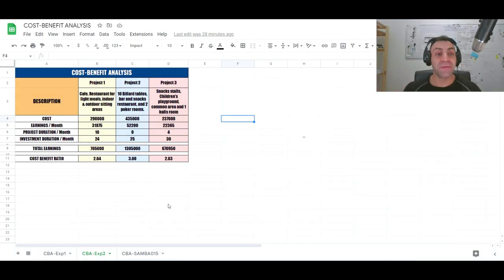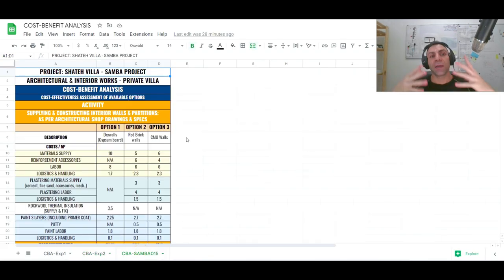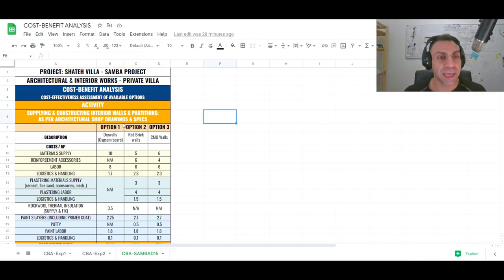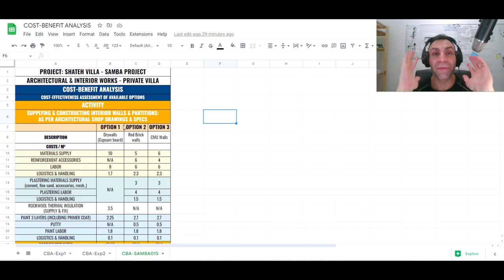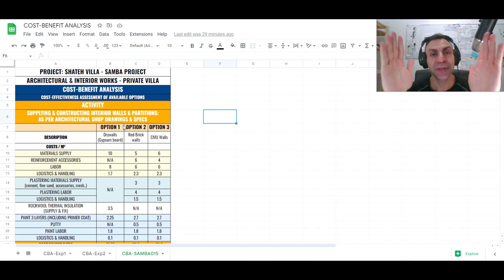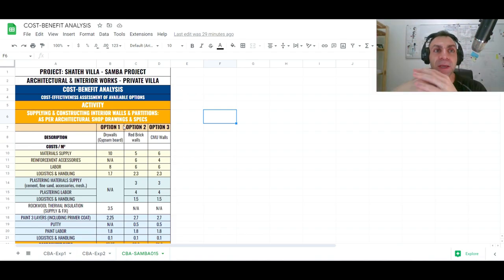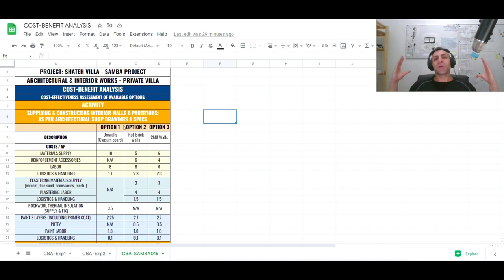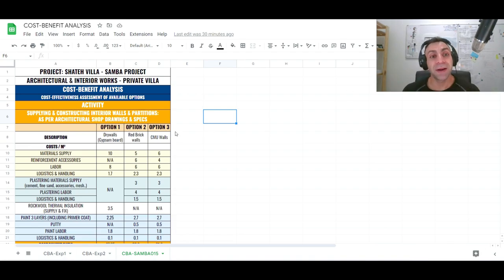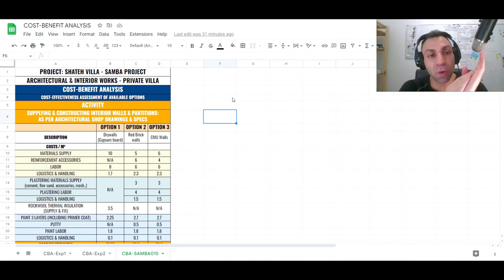Now moving to the next example, focused on a construction project activity. Here we have three options for choosing the type, technique, and materials of a wall in a portion of a project — to save costs, save time, or improve some aspect. The engineer or architect has suggested changing the wall type. Both alternative analysis and cost-benefit analysis can be deployed here.